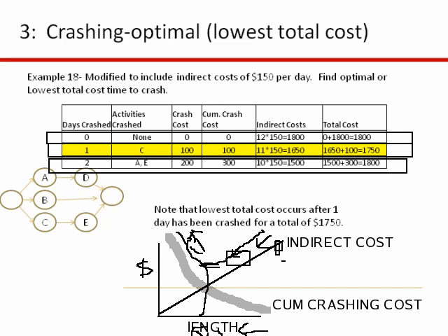Okay, there is a question about the slack time. So again, the path slack is just the difference between the critical path time and a non-critical path time. So you have to find all the paths and how long each of them are. The longest path is your critical path. The difference between that and the other paths is the slack. If you think about it as slippage, it is the amount of time that path can slip without making the overall project late. Okay, any other questions?